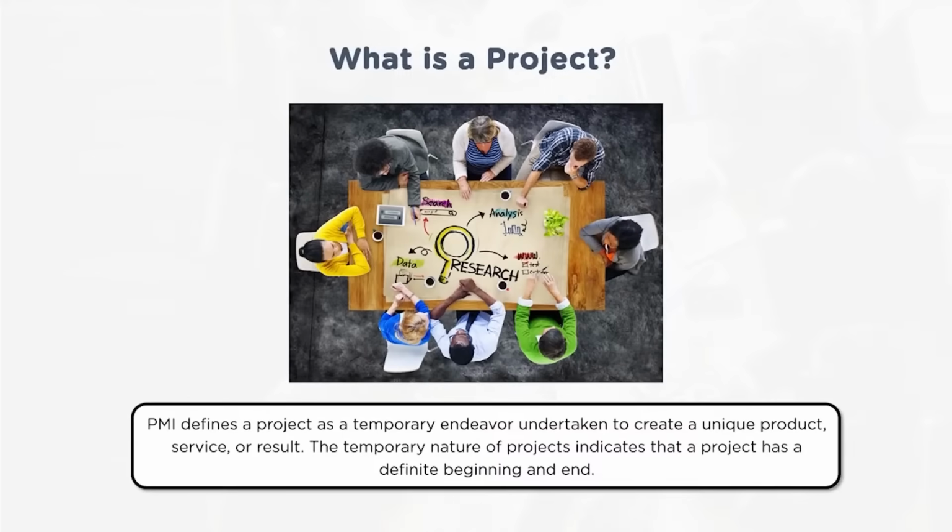From start till end, the result, service, or product which comes as an output of a project life cycle is not ended. Interestingly, in a product life cycle or a service life cycle, you come across many project life cycles. One project is initiated to introduce a product or service. The next project is initiated to enhance the capability of a service or product. The next project, initiated after some time, is to optimize something. Similarly, at the end of the product life cycle, a project is initiated to retire that product or service. So in a given product life cycle, there may be multiple project life cycles.